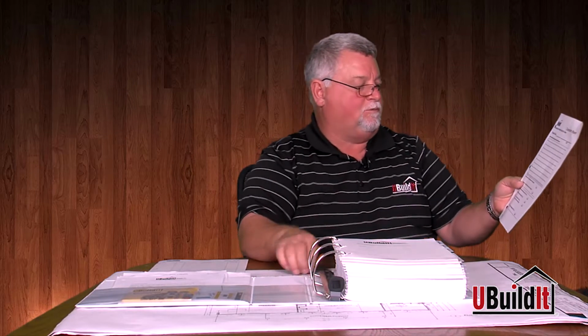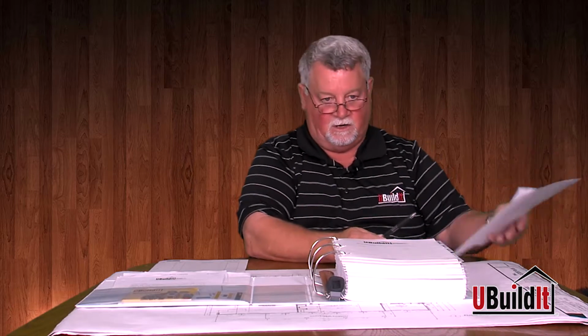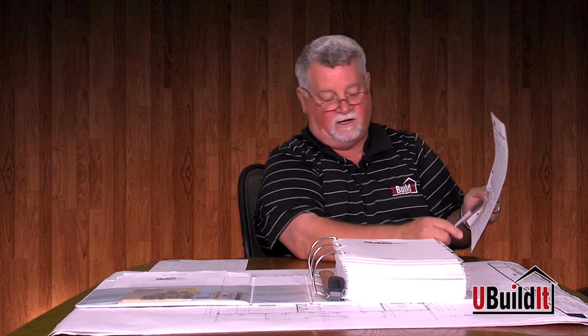On our consultants' reports, we have to review the bids for the upcoming phase of construction. So if we reviewed a bid with somebody for something that's coming, we put yes, and we put a brief description of what we discussed and what bids we reviewed. Are the municipal instructions to be addressed? Say, for instance, we have a failed inspection. We'll put whatever the failed inspection is on there, and we'll put if the issue has been corrected and been called back in for inspection or not.